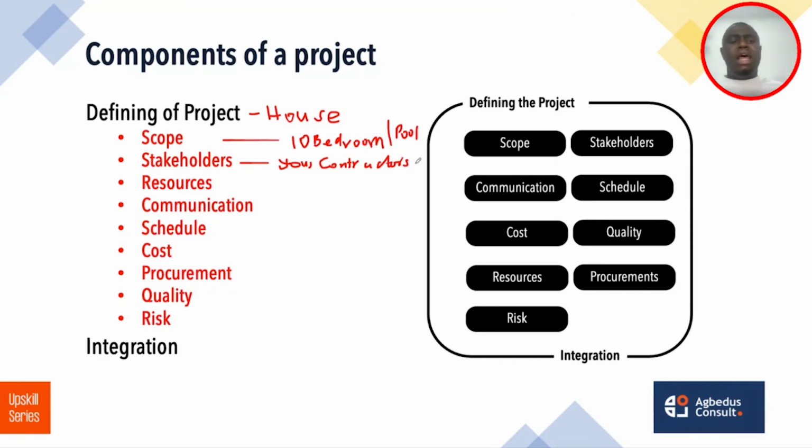For instance, let's say you decide to build a very high building. That means they have to dig a much deeper foundation. They have to use maybe certain equipment. Maybe there are rocks in that area, so maybe you need to blast those rocks. The people surrounding you are all stakeholders because maybe the blast will affect them. And so when you go to the mining companies or the mining areas, you find that even the villagers have some say in the project that is going on. Because when they have to do certain activities, they have to do a whole publicity telling them we're about to engage in an activity, we will bring hazard, so don't come to this area within this period. Those are stakeholders.